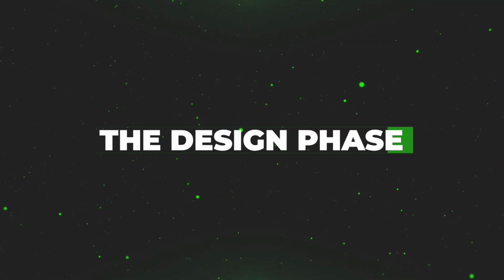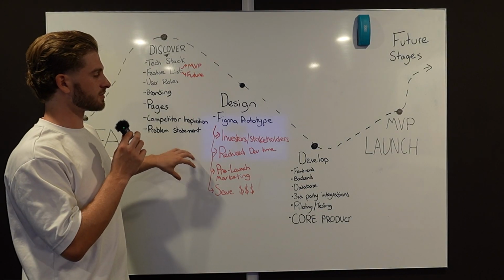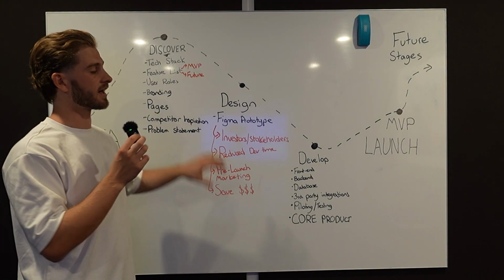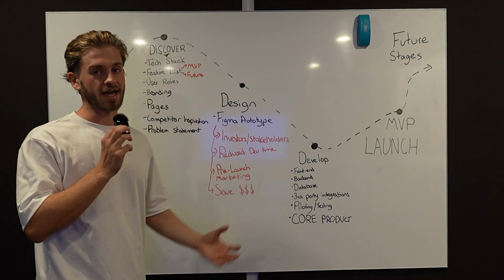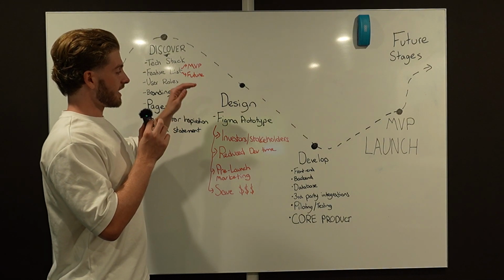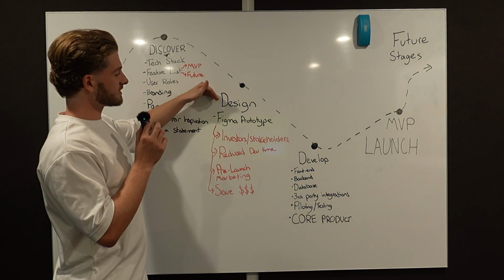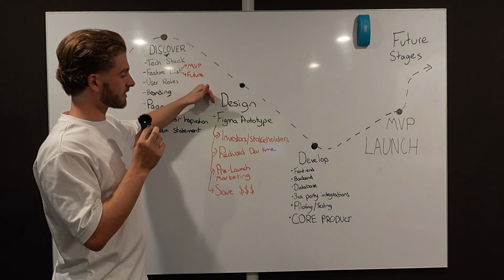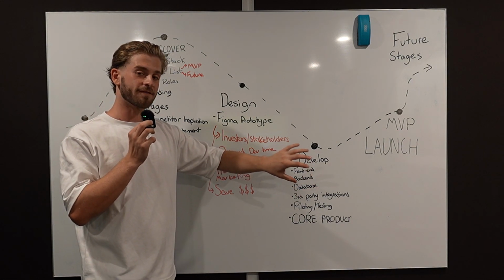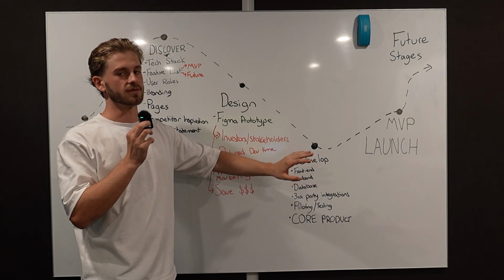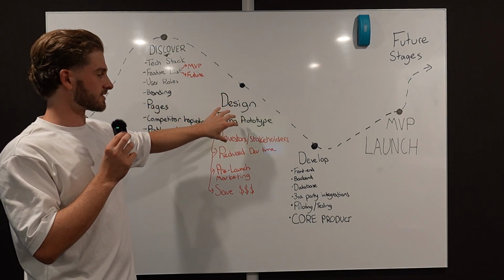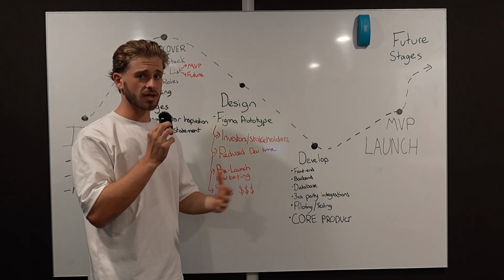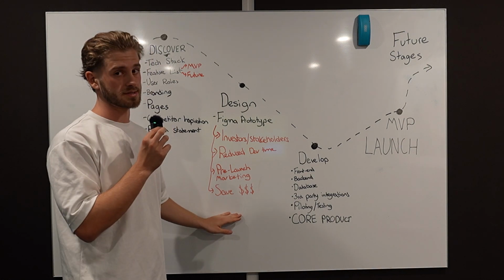Now, why is this even necessary? And to be honest, is this just a waste of time? Can you skip it? My recommendation to this, after building over 60 applications, is any time that you invest in this phase, if you do it with someone who's doing it properly, will probably save you about 5 times that amount of time when you go to develop. So I think this is really worth investing time in. And essentially it should only really take 1 or 2 weeks maximum.